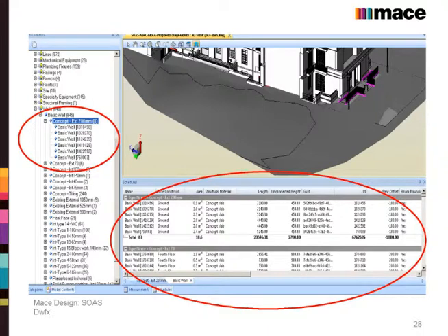Now, the bottom screen for our schedule is, we'll sort it out into the different wall types, but if you haven't got a spec reference, we're not asking you to put loads of information straight away. Give us an understanding that you're not going to have it, but that you've got a specification. Let's put the little specification code so we can go, all right, okay, cool, let's pull it out of the email, have a look. Not all the information is going to be contained in this model.